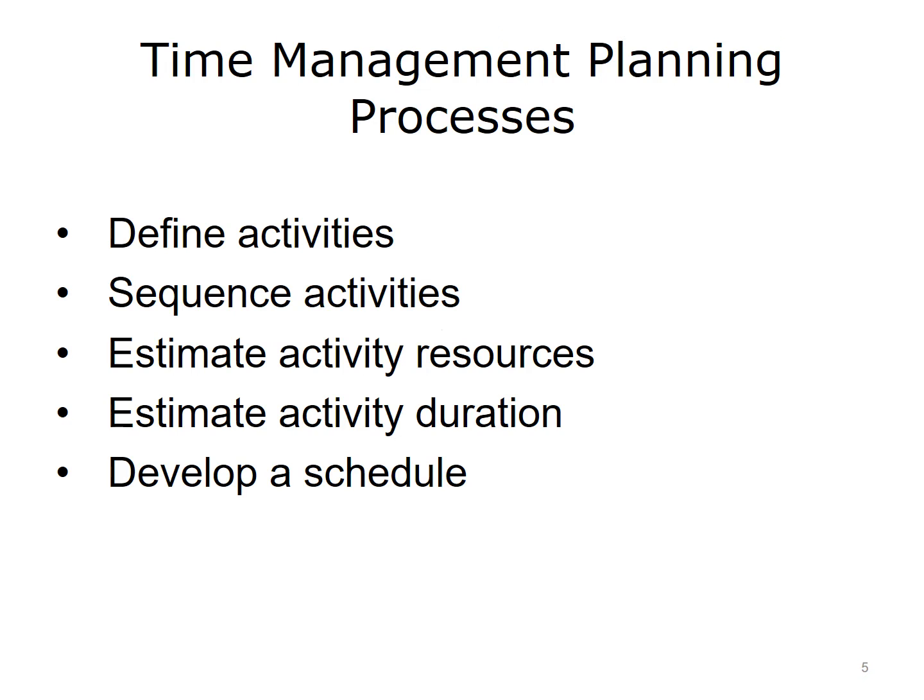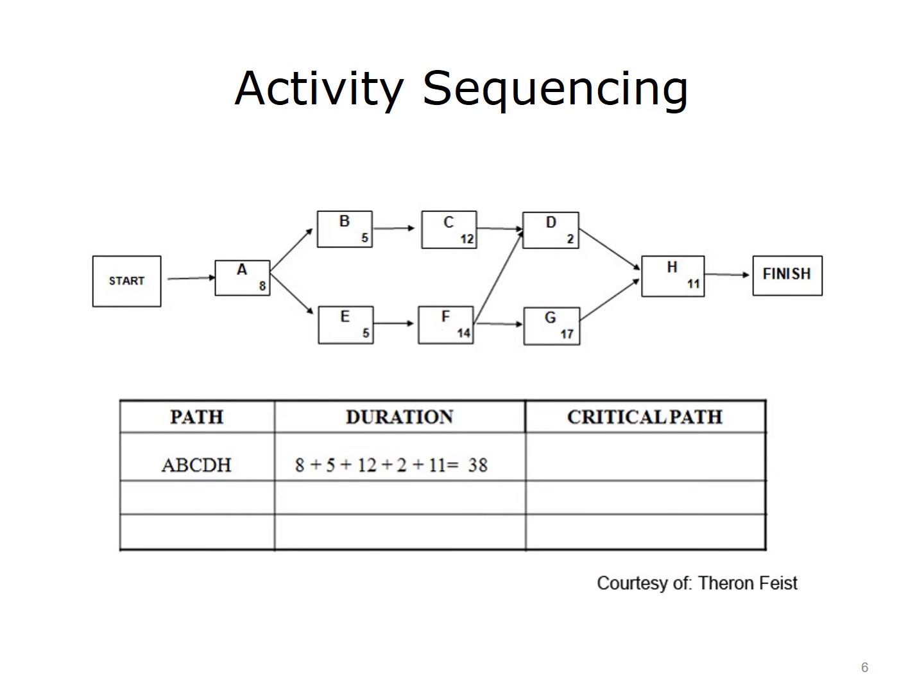When the WBS is created, the scope of the project is decomposed to the work package level. The work packages are further decomposed into activity lists, which help develop the project schedule. This diagram is an activity on node diagram. Boxes represent activities and arrows connect the activities and show dependencies. This is a very common method for performing project scheduling.